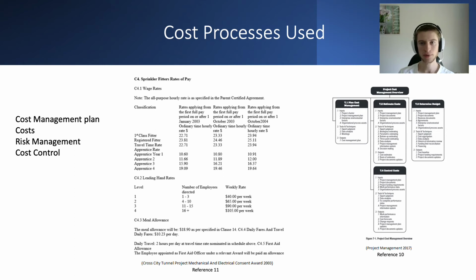This was likely a top-down, rough order of magnitude estimate with low accuracy. It is likely this value was obtained applying a mixture of analogous and parametric estimating. However, after the tendering process, Cross-City Motorways could rely on their previous and now increased project knowledge to produce a more accurate value of $620 million.